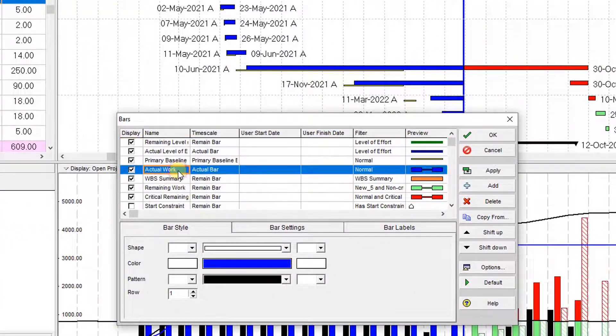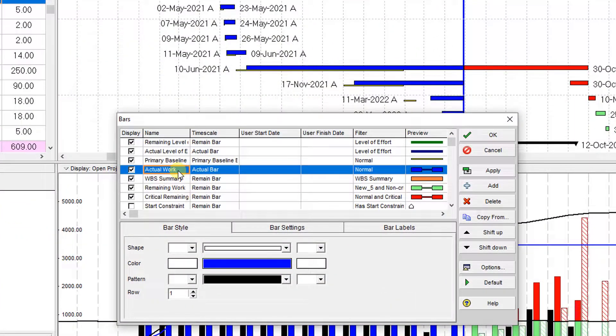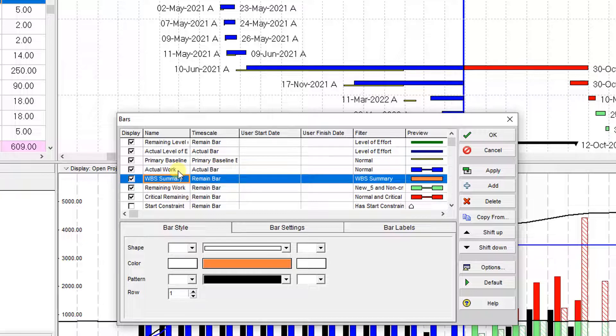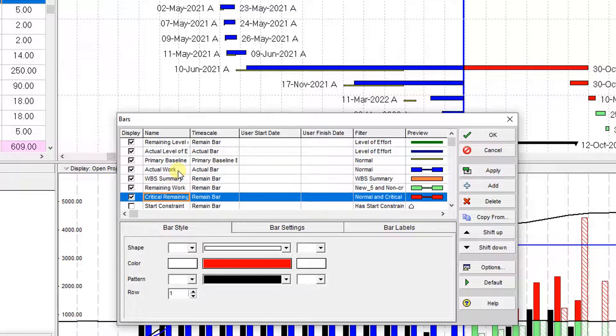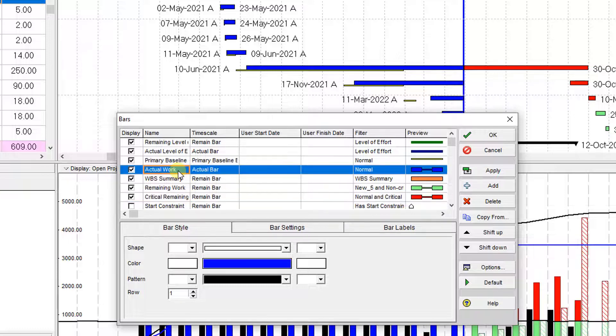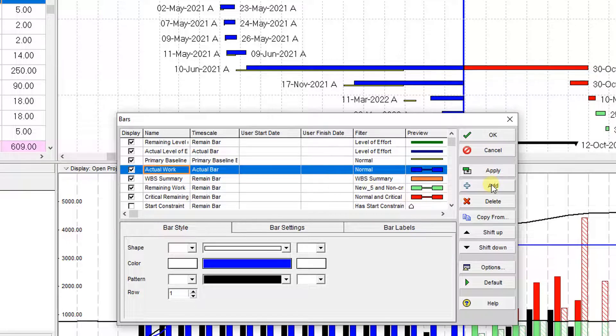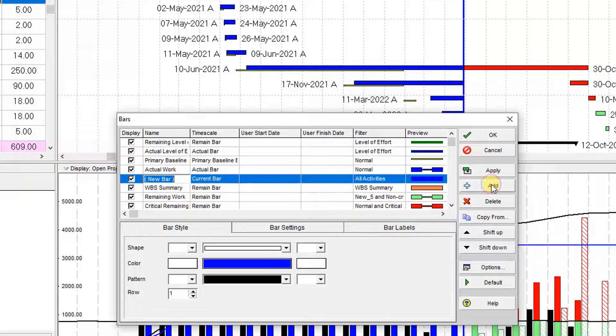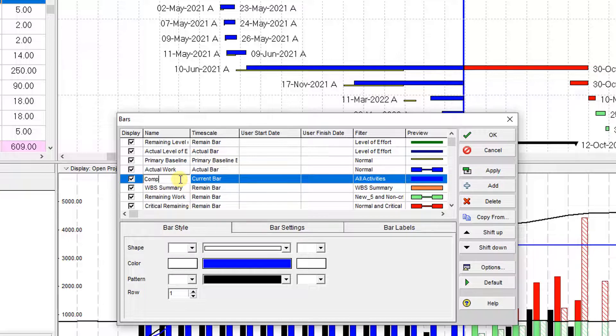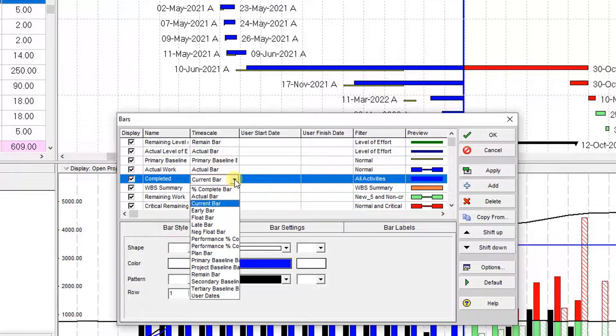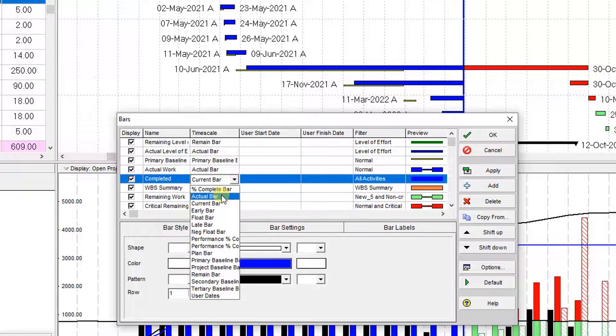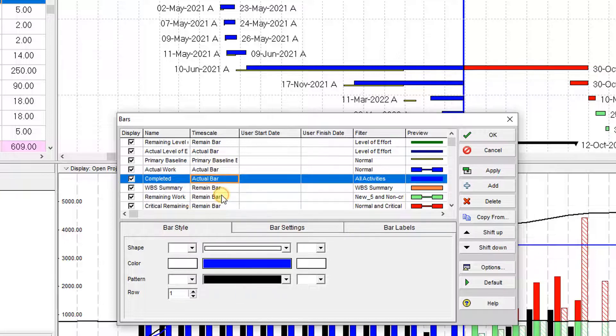Here we have actual work, summary, remaining work, and critical remaining work. We need to create another bar for the actual work, so I create another bar and name it 'Completed'. The completed task should work based on the actual bars, not the current bars, so I change it to actual.